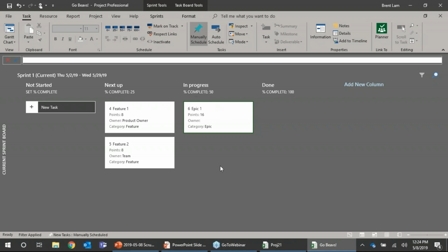Okay, now as we get into our sprint planning here, here is tip number 2 for today that I think is really important. That is, if you're new to Agile, your teams are just spinning up. Oftentimes I see teams really spin because they're starting to get in their first sprint and they want to know, I need to assign points for each of these stories, right? We need to size these. How do we know what a 1 is? How do we know what a 2 is, a 4 is? As well as we need to determine our velocity. Our velocity is how many points can the team complete in one sprint period, right?